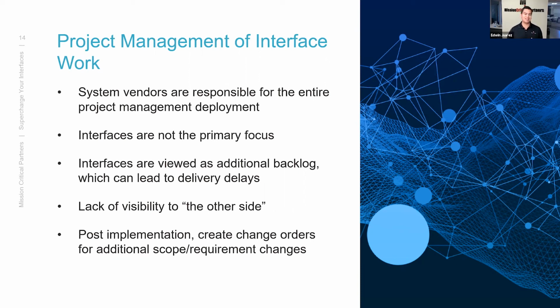And when we've seen that, it can lead to delivery delays, because you need an interface, but it is added to the vendor's backlog of development efforts. The other part of that is that there's a lack of visibility on the other side. They're not engaged with the other solution that we're trying to interface with. They're just responsible for the interface that's part of the main product and integrating to another application. So there's not a lot of visibility on the other side.